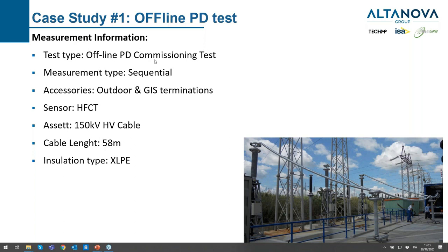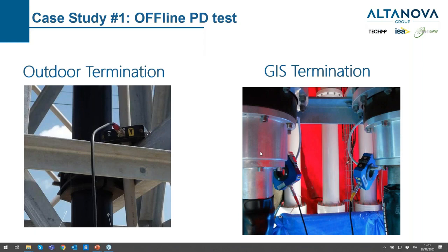The first case study is an offline PD commissioning. The test was sequential; the accessories were outdoor and GIS terminations. It was a very short cable — 150 kV, cross-linked polyethylene (XLPE). The sensors used were high-frequency current transformers, not permanently installed. We had an outdoor termination sensor and a GIS termination sensor.